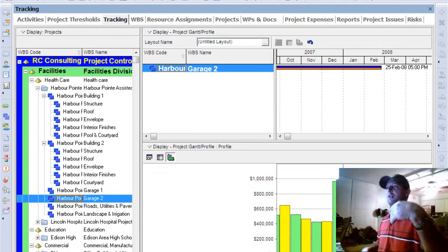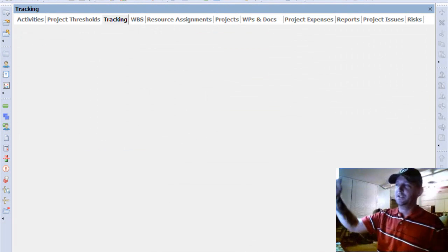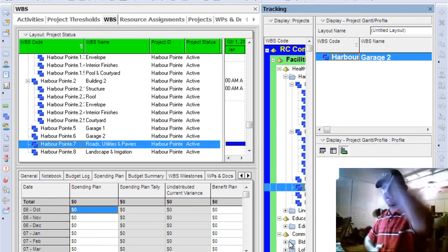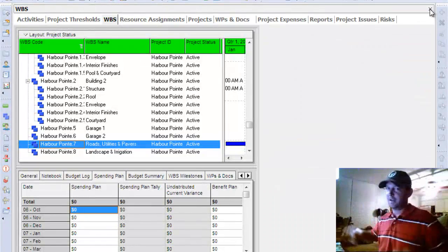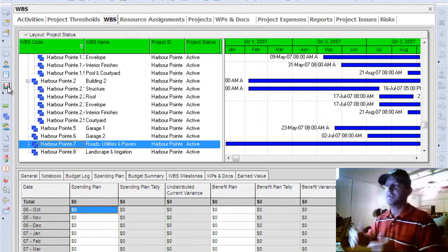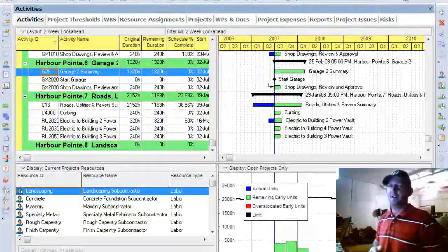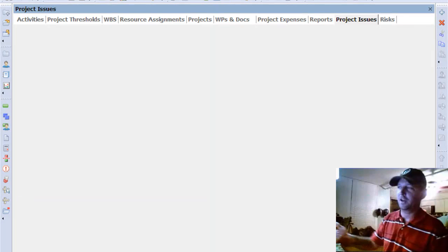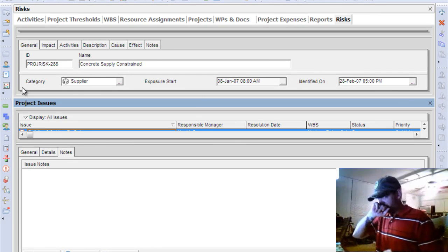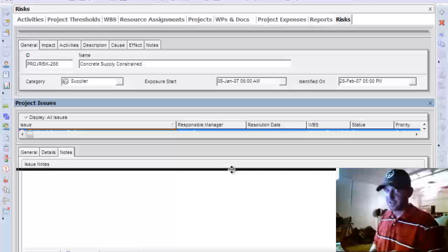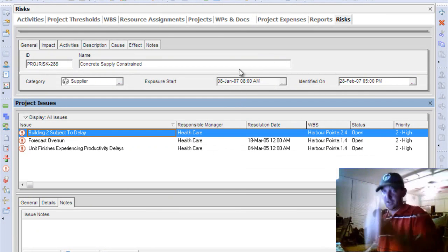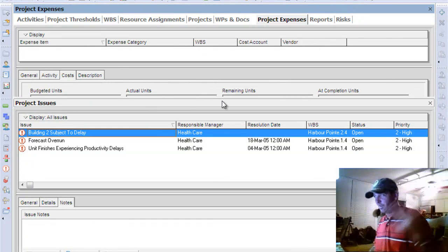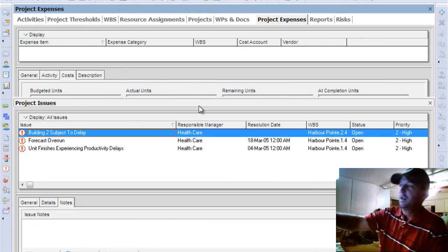so you could tell which users are in your project at any given time. On your projects tab, you just do file, open, to open a project, do a Control A, select every project in the entire database, and then just click users, and there they all are. You can tell who is in every project at any given time, then you can add a column to your activities tab for last date changed and changed by. So you can tell who changed your stuff and who didn't, who's in your project, who isn't.